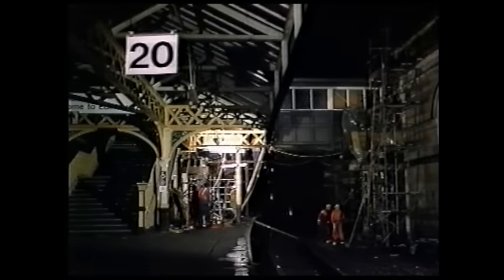New construction methods came into use during the project, speeding up the rate of completion and keeping costs down. Electric services to Leeds began a year ahead of schedule, thanks to this innovative technique using steel piling for the mast supports. In many places, this method was used instead of the time-consuming system of laying concrete foundations.